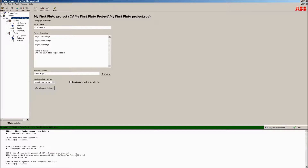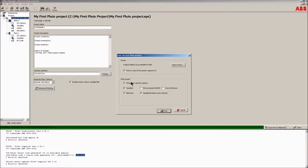A CRC is created for the project. Use this to track the version of the project and to link it to its documentation. Even small changes will result in a new CRC code. Please keep that in mind during commissioning.